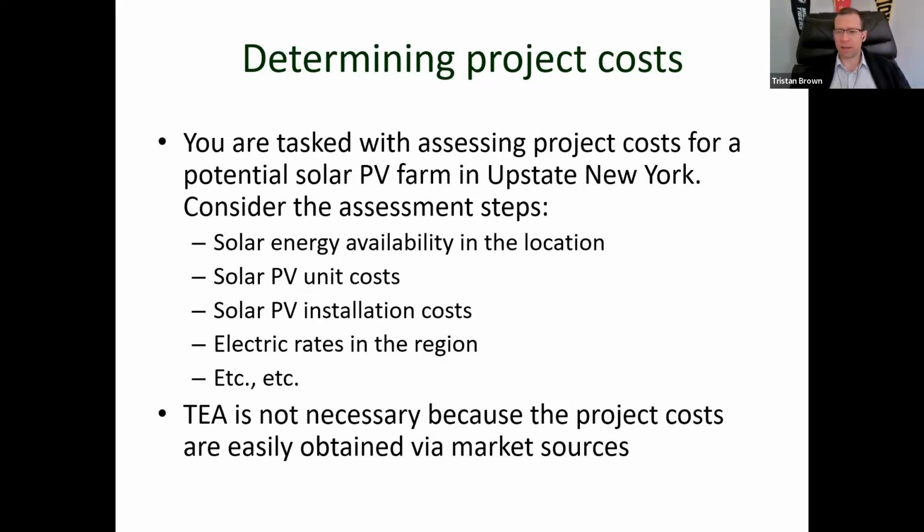So just to give you an example, right, where we start talking about this type of thing, let's say that you are tasked with assessing the project costs for a potential solar PV farm in upstate New York, right? And so by project cost, what I really mean is how much is it going to cost to get this in the ground? What's it going to cost to operate? At the end of the day, you want to know how competitive it's going to be. Well, you'd probably follow something very similar to the steps listed here, right? You're going to want to know what the solar energy availability is at the location.